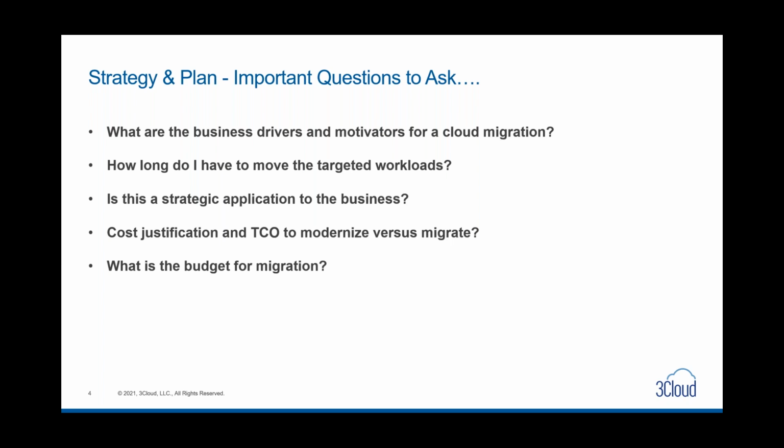Based off of the complexity of the app, it's going to take X amount of time to modernize, which is going to cost you X. In that time, if we think about all the patching and all of the other upkeep, there's going to be X amount of cost associated with that IaaS infrastructure. And if we can shed some of that IaaS infrastructure and move to PaaS native services, the actual runtime in the cloud is going to be less expensive than moving it as is over the lifetime of its life cycle.